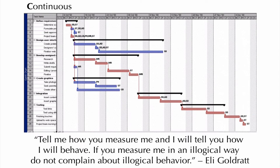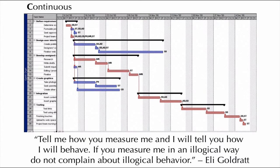You're looking at a Gantt chart, the backbone of traditional management and cost accounting. It represents three kinds of constraint: time, operating expense, and scope. The most constrained part of this chart is called the critical path and it's colored in crimson here. Goldratt said business decisions must account for many more constraints than just those three. This theory of constraints says that in any system of production at any time there is always a single dominant constraint. Goldratt called it the bottleneck.